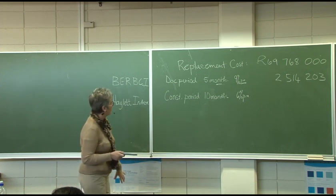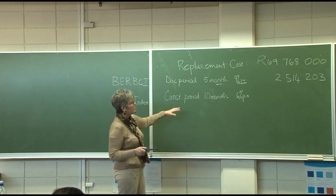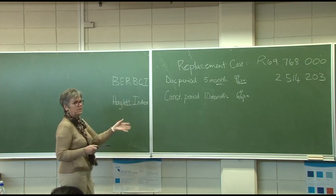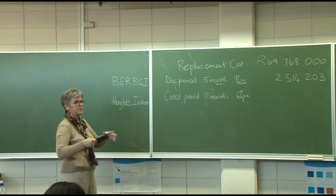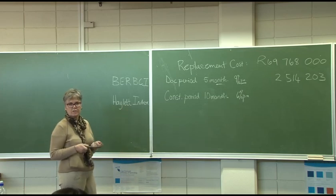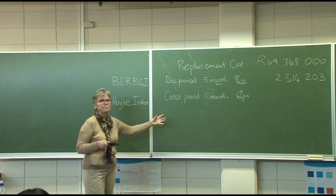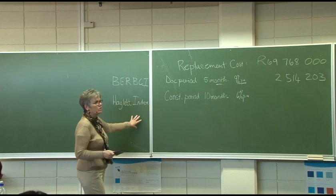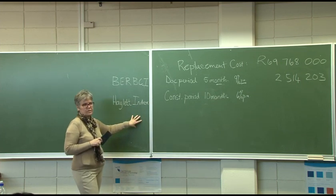People, they will literally split it. They will say 3 blackboards, this is the length, this is the height, times 50 classrooms throughout the building comes to say 870 green blackboards. They will specify it so that when you as a contractor price it, you can't price it on an inferior product. This is the exact blackboard that we want.